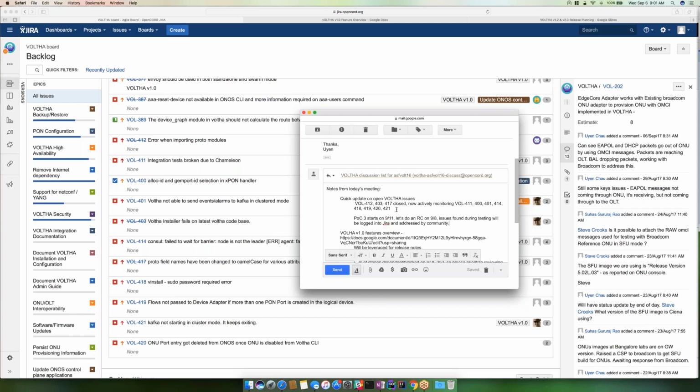But if it's not a release, then you probably won't make a release until the end of POC 3, which is quite a bit of time before that release is made. So there's potentially a PR component that needs to be considered in that. So we could do a 1.0 release, and then all defects after that would roll into 1.0.1, and then they would be cherry picked back to master for the 1.1 release.